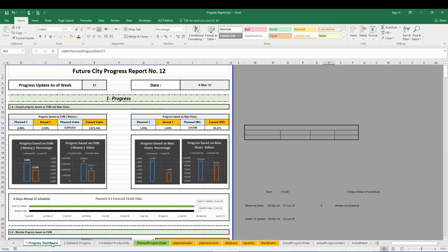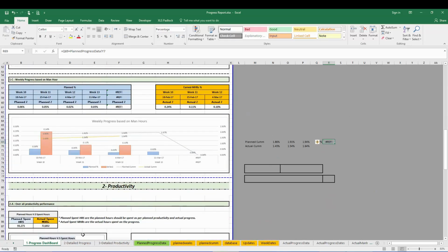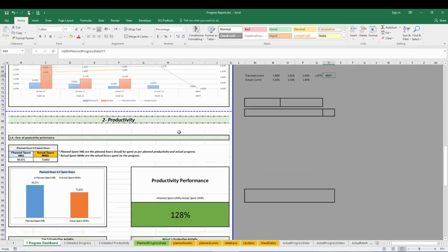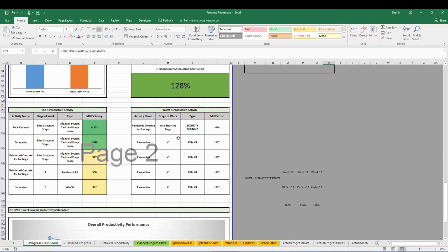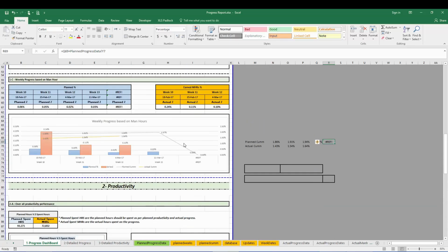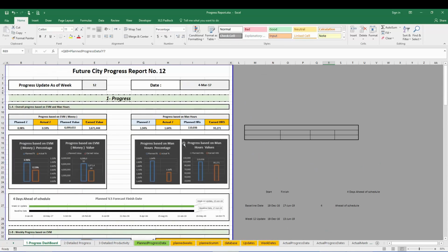This dashboard is for senior management, and the detailed report is for the construction team. So what else can we give them? What else can we share with them? What information can we tell them? But consider that the dashboard should be limited to 2 pages, and for the detailed report, there is no limitation. What you can present in 2 pages that can catch the senior management's eyes and show that you are a professional planning engineer.